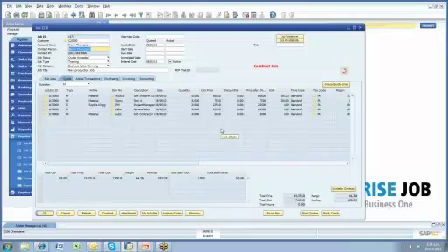Okay. And you'll notice I've just got a couple of lines here. These are both staff lines, and this is some project management and some general labour. Here I've said that Sophie is expected to do the work so that I can later on analyse my variances. What did I quote? How many hours did I quote for Sophie? How many hours did she actually do? Or I can leave that off. So I could just have, for example, here labour time, I'm saying 30 hours. Then my reports will show me I expected 30 hours of time, and then how many we actually used, irrespective of who the employee doing it was.